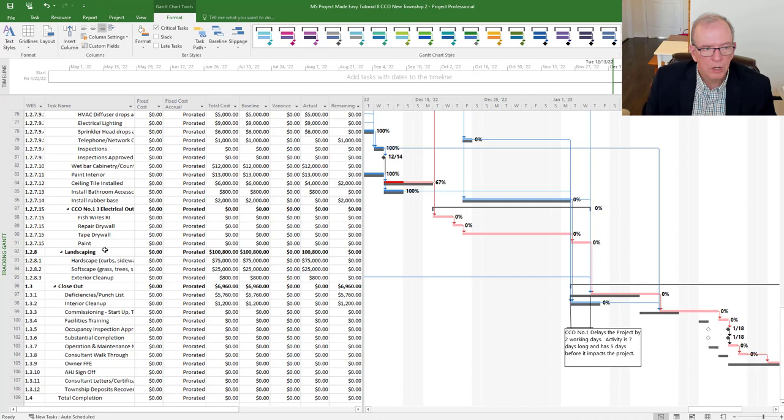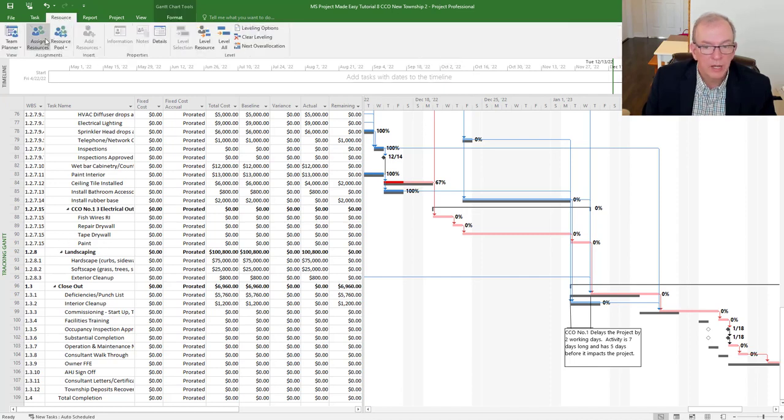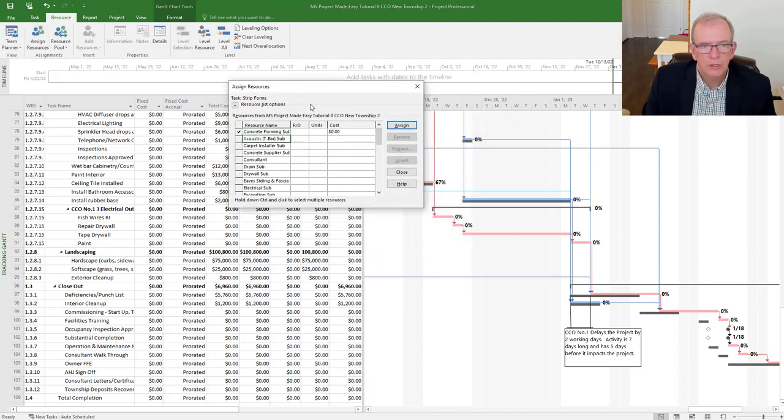So if I was doing it with costs, I could, with my resources, have added costs to the various assigned resources on the various activities. I wasn't assuming this video was necessarily on cost loading it, but if you're into that, go back and look at one of my videos on adding costs, and you'd see that if you created resources, then you could add the costs for the electrician. I'd assign the electrician there and a cost, and I would assign the acoustic subcontractor or the drywall subcontractor a cost, and the painter a cost. And then it would sum up that cost.